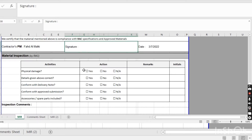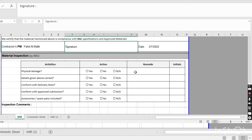Now, material inspection — this is the inspection checklist inside the material form. When the consultant comes, he will check all of these things. He may also check more things and ask for more detail. These are the basic details he should check. Before he arrives, you have to do the pre-inspection of the material. For physical damage: if there is damage, click yes; if no damage, click no; if not applicable, write NA. Here you can write remarks.